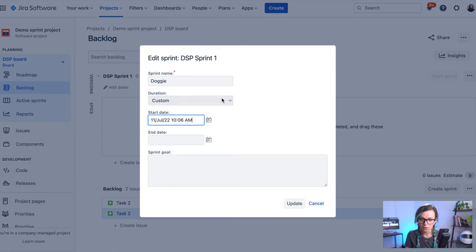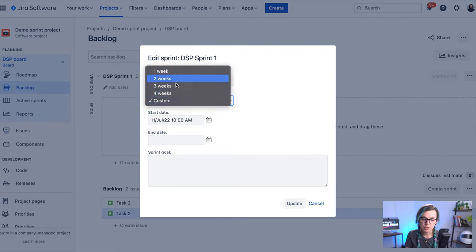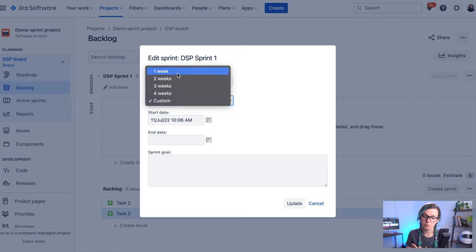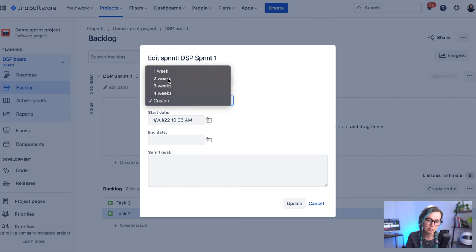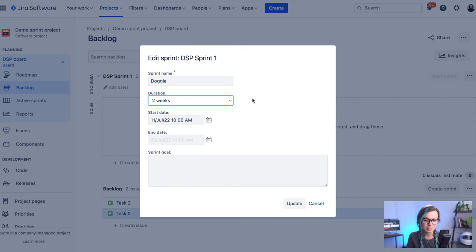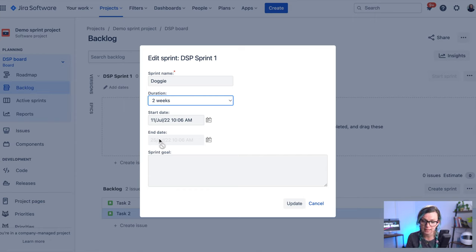Or what you can do is you can select one of the predefined durations, which is one, two, three or four weeks. Usually it's not really recommended to have a sprint longer than a month because then it's not really a sprint. So let's say two weeks is kind of like a typical duration for the sprint. So you can select that.